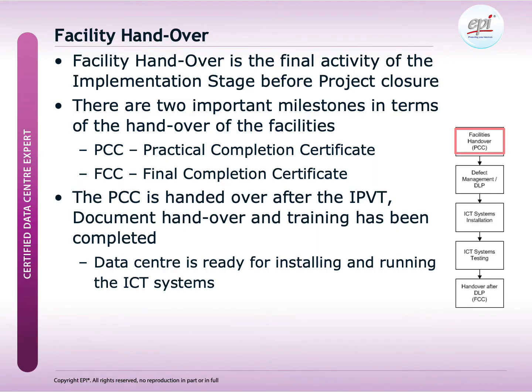After the IPVT, the practical completion certificate can be handed over to data center operations, assuming that all documentation is complete and handed over and that training for the operations team has been completed.